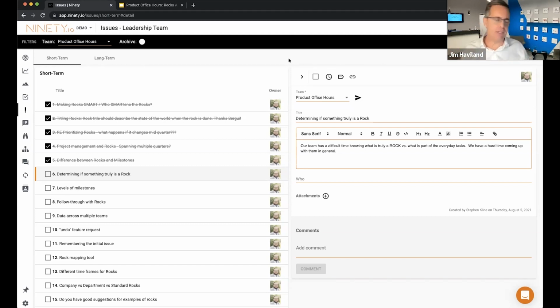You just say, hey, this thing is really out of date. If it was more like this, if it was available in these formats, it'd be better. Great. That's a rock. That's your rock. And then how will I know when it's done? When everyone recognizes it and knows where to find it, you can determine that. Designing it could be phase 1 too, and phase 2 could be implementation. That's a really common one for us at 90, because we recognize that those two things have such different dependencies that you kind of want to break them apart. Let's get the design done, and then next quarter I'm going to come back and actually implement.